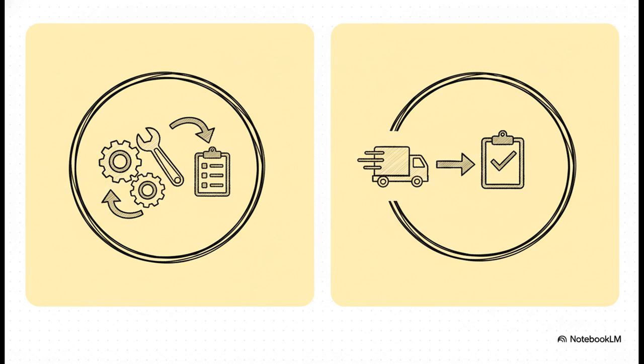An internal one is like your dev team needing to finish coding before the QA team can start testing. An external one is when you're waiting on a government permit or a key piece of hardware from a supplier. You can't control when it shows up.